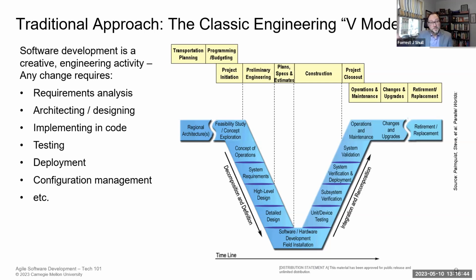And typically what would happen is by the time I pop out on the right with some capability, because the technology is moving so fast underneath me, the technology itself might be obsolete. That if I were to redesign the system at that time, I have a very different set of expectations and a very different set of components I might build it out of.